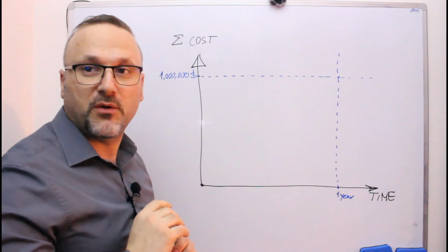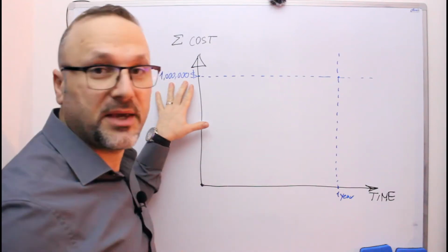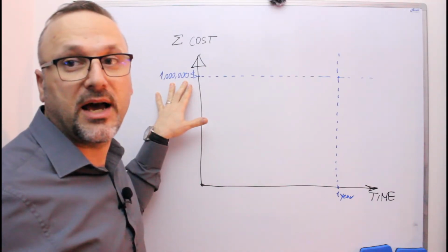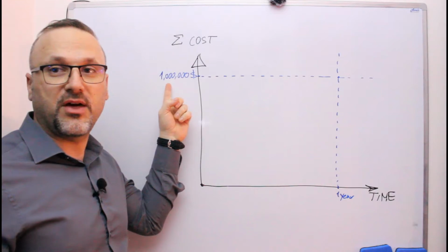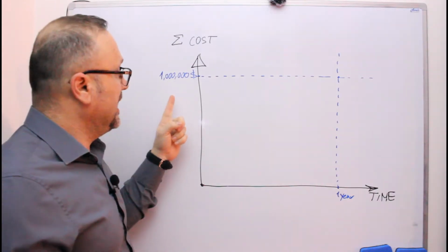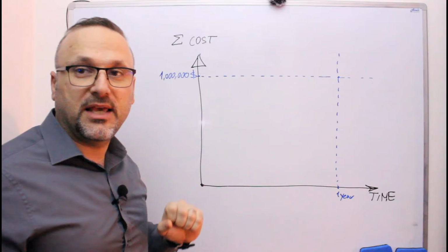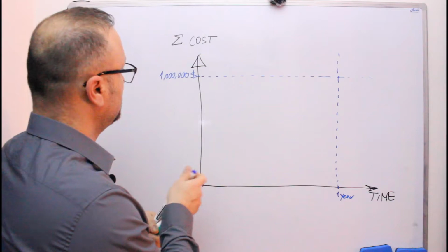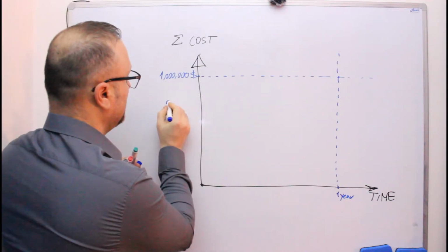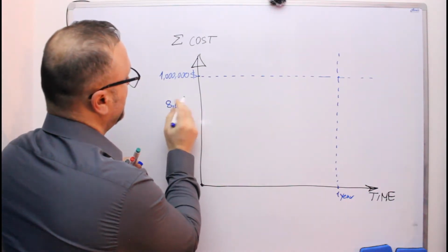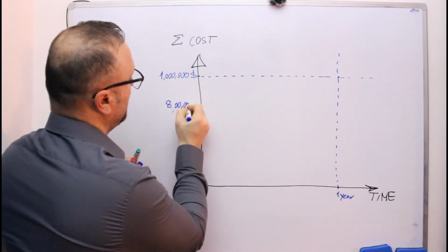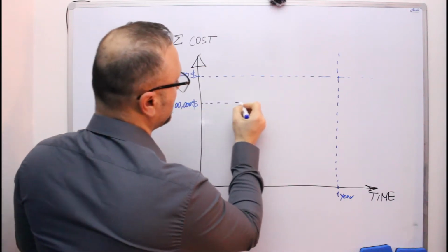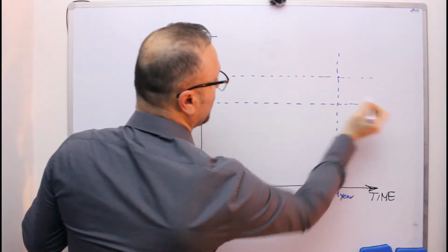I have explained the cost overall of the project, and I'm estimating that from this 1 million US, I am creating 200,000 as a profit, and the cost estimated for the project is 800. So let me just draw the 800 line. 800,000 US, and it hits over here.